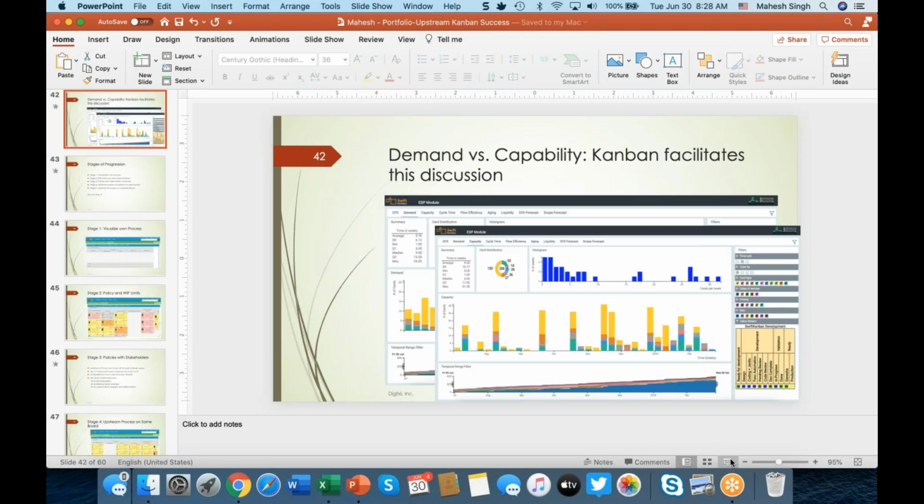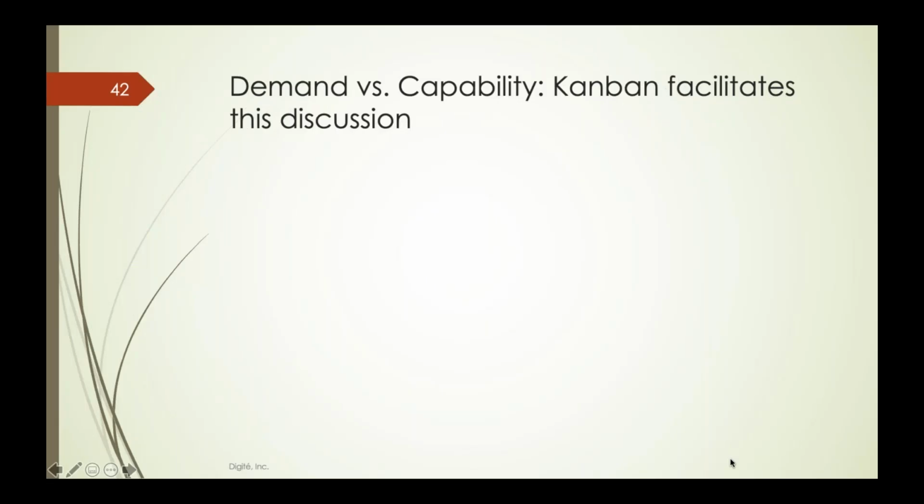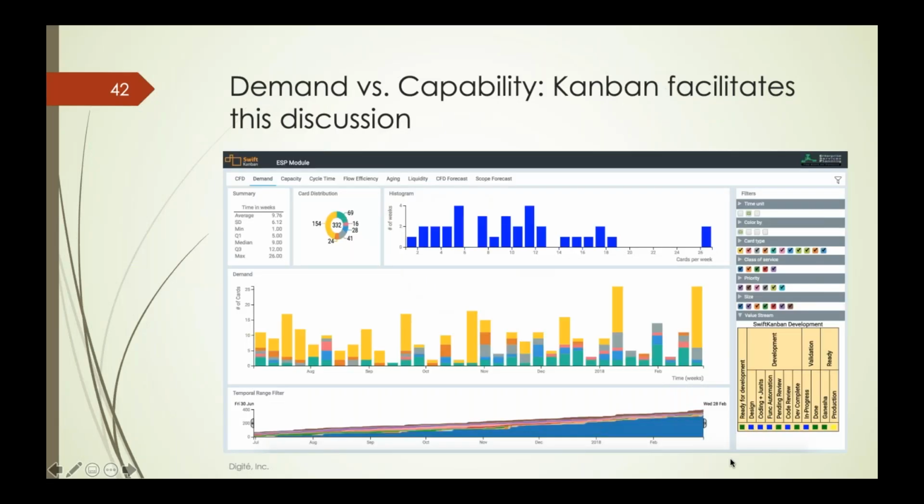So in general, what is it that organizations are trying to improve, and what is it that they're measuring? Ultimately, the level of abstraction determines what level of Kanban board you're looking at. And at that level of the Kanban board, your basic measurement is the cycle time of delivery of work, whether you call it cycle time or lead time, and whether it is focusing on specific parts of a value stream or looking at extended value streams.